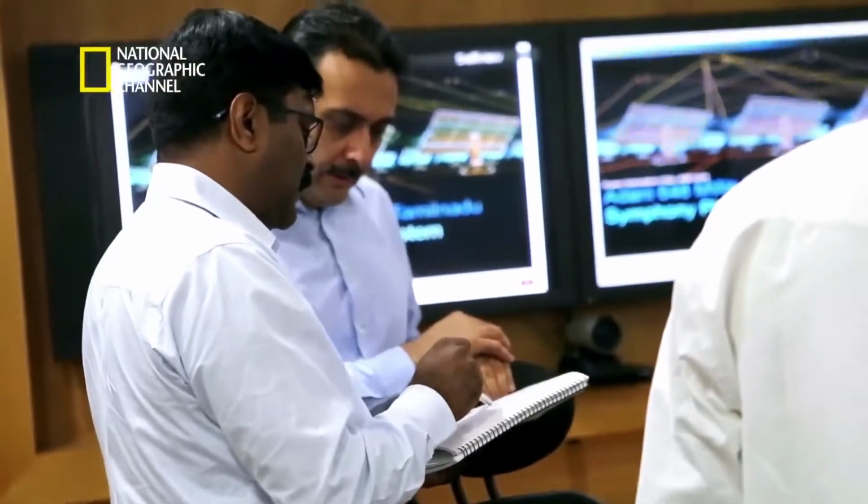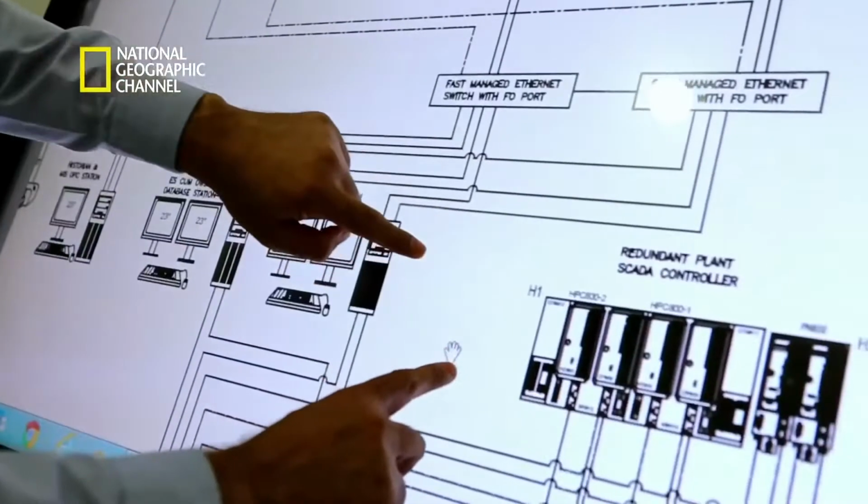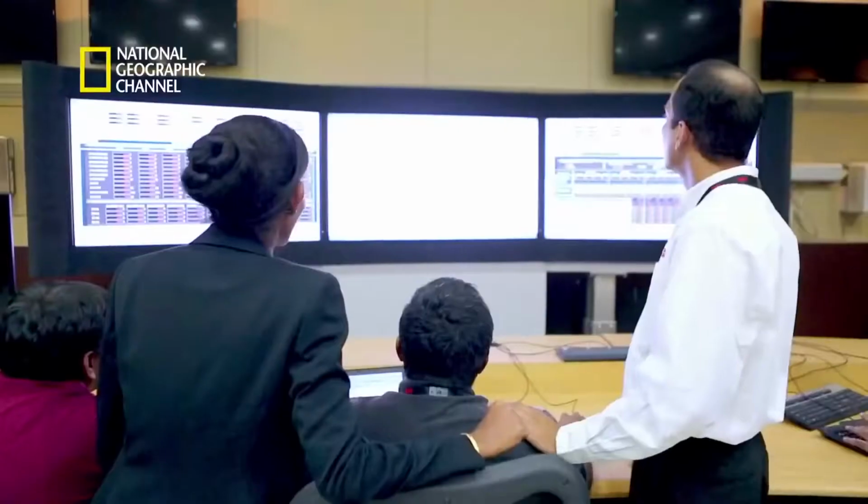2 days became 1 month, another timeline setback the engineers had to absorb. Challenge was that we had multiple suppliers of equipments. For example, the relays, the control and protection relays, the inverters themselves, and all of that has to be validated with the supervisory control and data acquisition system. Now, to do that, in some situations, it was not possible for us to get the actual equipment.